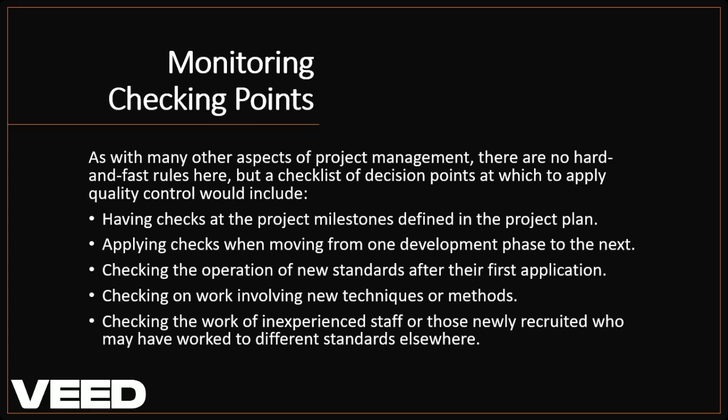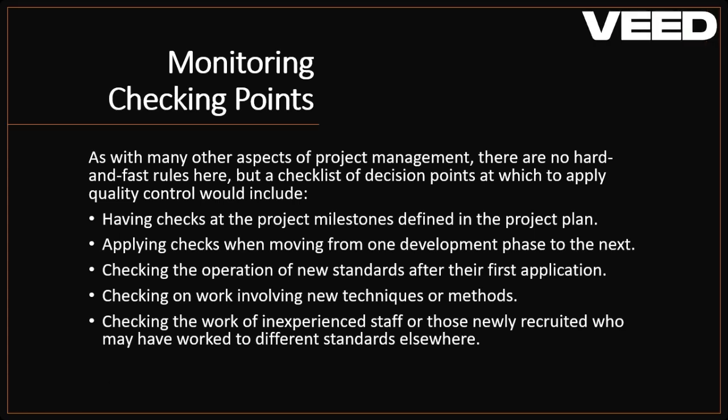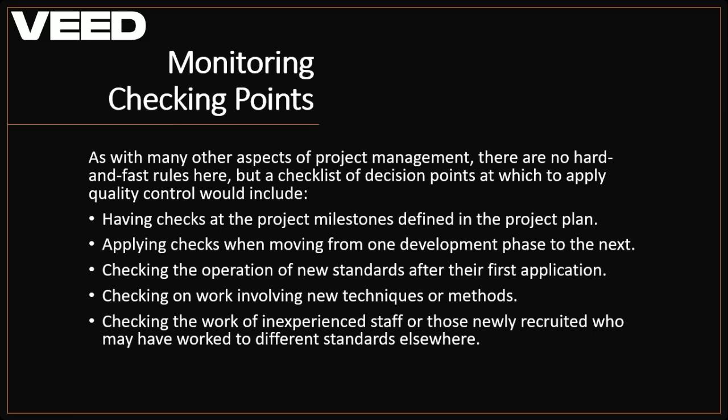Additionally, you also ensure that there are checks when you have staff who are not so experienced or staff who have come into the project team. You are using standards that you have used before, but for them, that is the first time they're using those standards. So, for deliverables produced by such team members, either inexperienced, meaning maybe they are straight from school and don't have industry experience, or inexperienced with a particular standard or technology, then in those instances you put in place additional checks to review what is being produced, again for the reasons that we talked about of conformance, detection of errors, and so on and so forth.